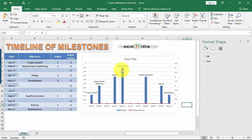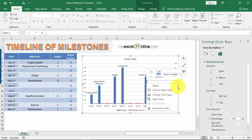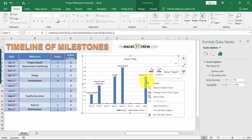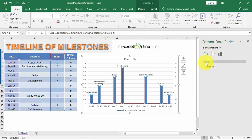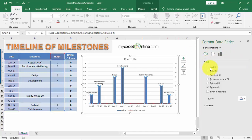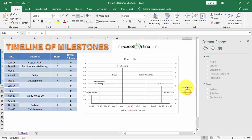Now that we have thin lines from the error bars, let's remove the blue columns since we just want the lines to show. Right-click on the column chart — make sure you select the column chart, not the error bar — and choose Format Data Series. Under Fill, select No Fill, and under Border select No Line.